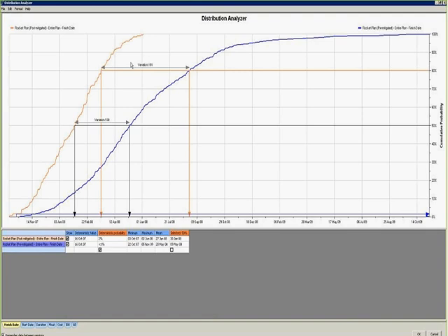And what you'll notice is on your finish date, your 100% on your risk mitigated plan over here is happening in June, whereas over here it's sometime in October. So you've basically reduced your upper bound by 5 months, which could be huge, especially in terms of cost.